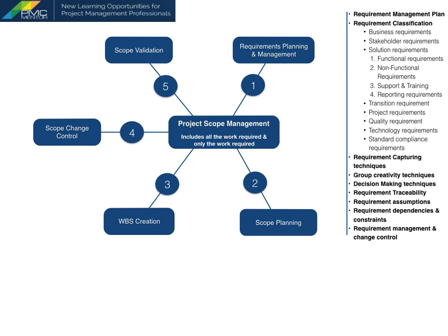Requirements must be traceable to their origin and must be linked to business and project objectives for creating true business value. Requirements assumptions, dependencies and constraints pose a natural risk, therefore they must be properly documented for risk management and analysis. Finally, requirements should be documented with sufficient details for finalization, prioritization and for proper monitoring and control.